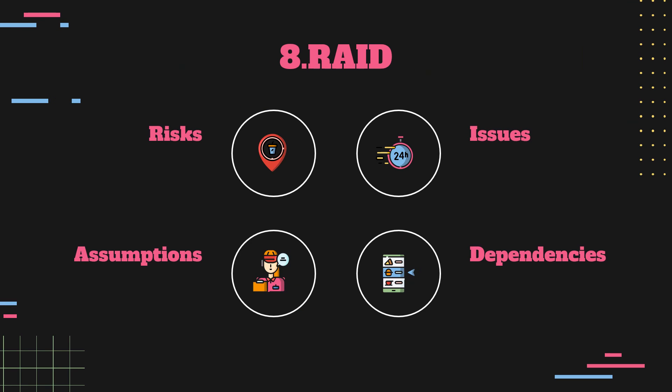Section 8: RAID. This part gives credence to the thoughts and planning that went into the requirements document. Use this section to demonstrate due diligence before laying out any criteria. Split it into four sections: Issues, Risks, Dependencies, and Assumptions. It will assist you in developing a more thorough comprehension of the issues and risks that the project faces.